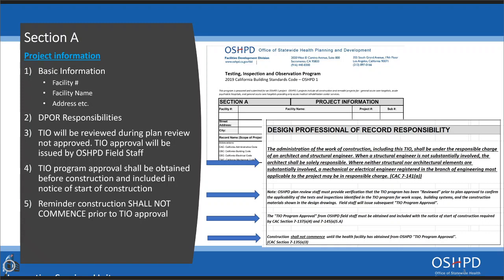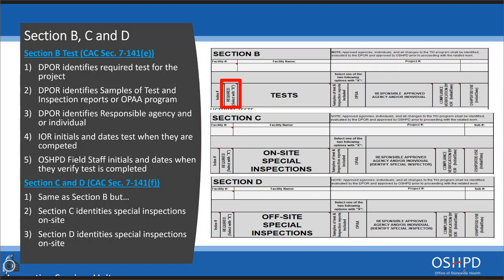Sections B, C, and D cover tests and special inspections. The DPOR identifies the required tests for the project — the DPOR typically has in-depth knowledge of the project, which is why it's their responsibility to identify required tests and inspections before submitting the TIO. The DPOR also identifies whether samples of tests and inspection reports will be submitted or if OSHPD's pre-approval agency (OPAA) will be used. If the DPOR selects the OPAA box, no samples will be required for that specific test, but the OPAA program only applies to structural elements — not others like penetration-rated assemblies, i.e., fire stopping.